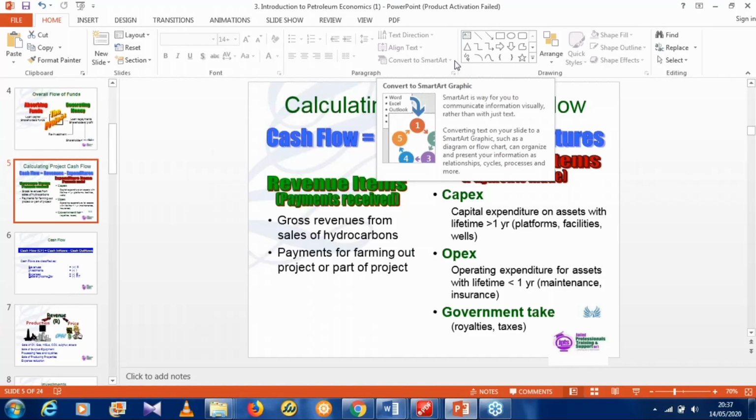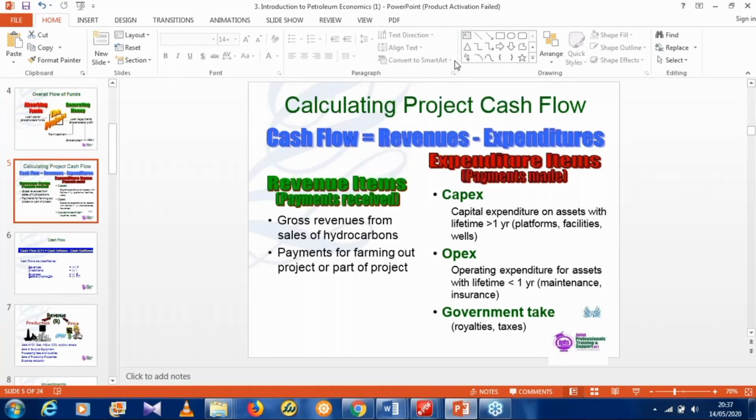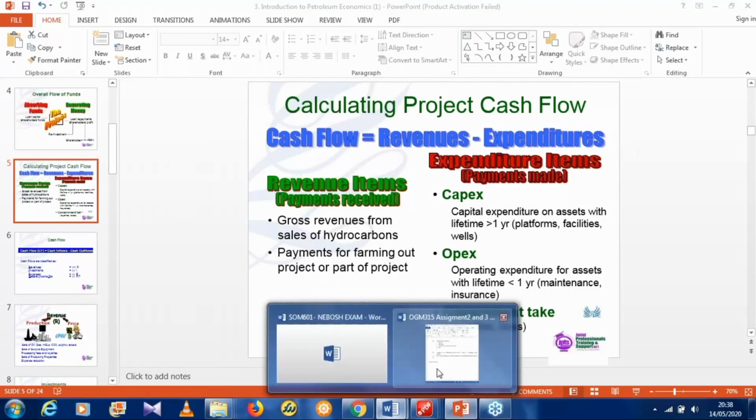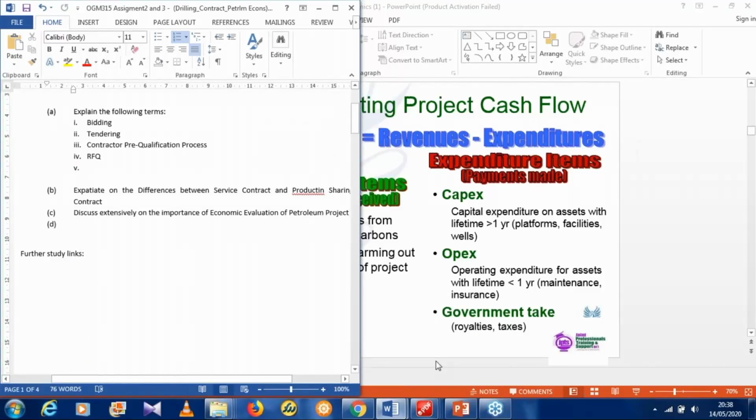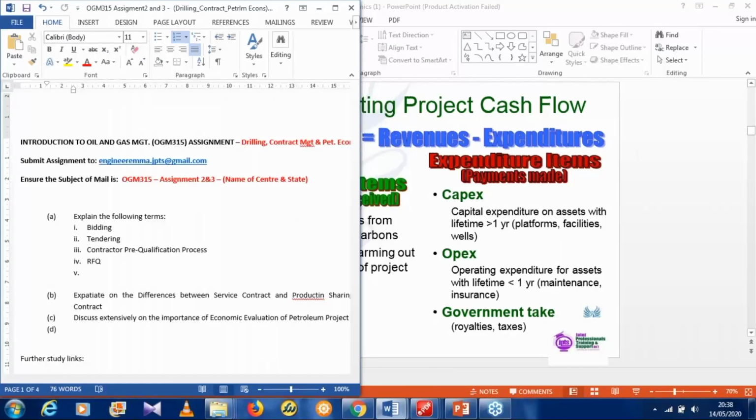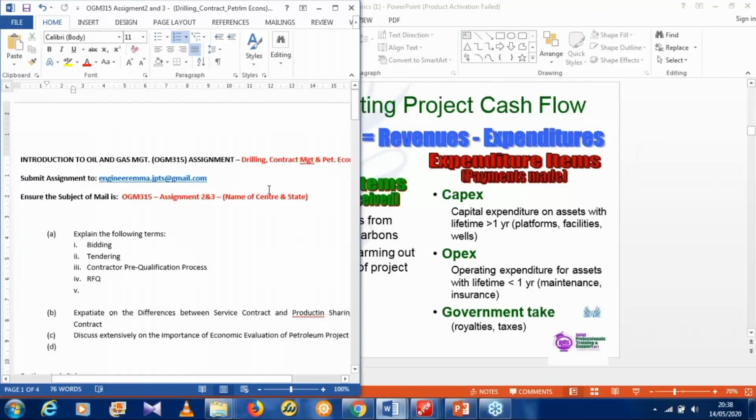There are also royalties to the traditional rulers. In most of the projects we've been involved in, before you even start the project, you have to go and see the traditional rulers in that area, have an agreement, and pay them some royalties. Also, the Nigerian constitution recognizes the Local Content Act, which is the law. Most times you have to engage a ratio of about 30 to 70% for the workforce, so you must engage indigenes from that locality for your project, which is very important.